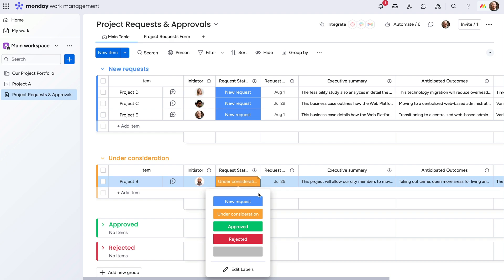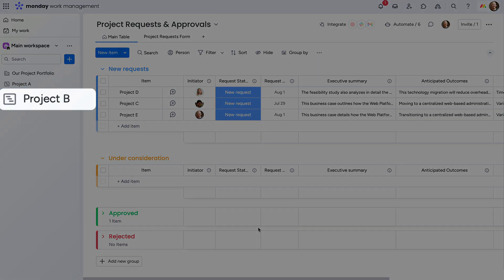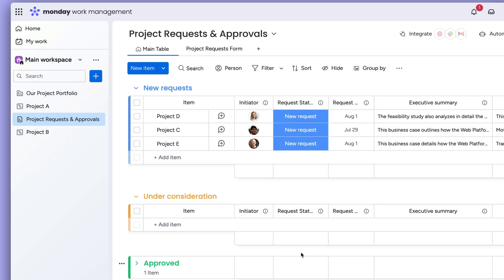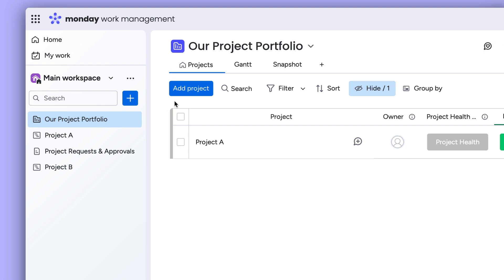Once a project is approved, a custom automation triggers to create the new project board, which we can then add to our portfolio.